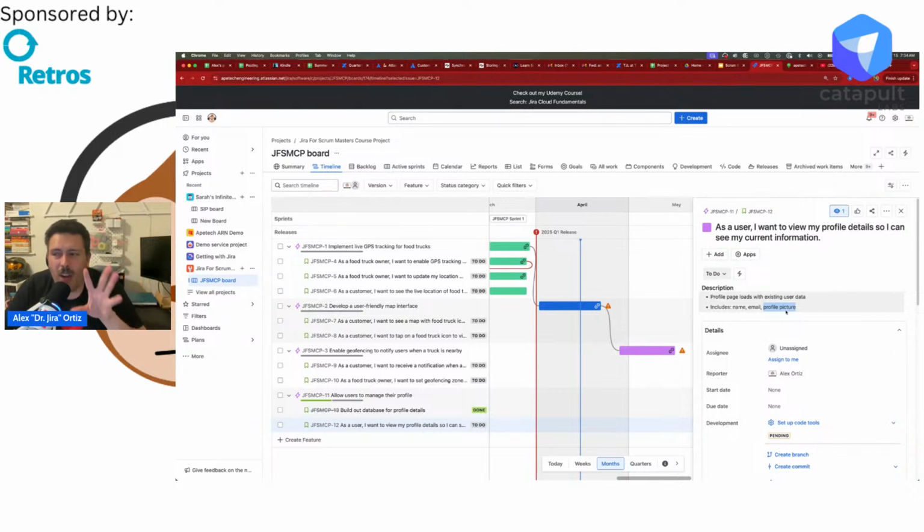And so again, you wouldn't want to negotiate and build it into this one because that's increasing the scope significantly, right? Adding key functionality of being able to edit profile pictures, maybe something that's going to take more than a few hours, I would create a new story. But again, the negotiation is, well, what if being able to edit a profile picture is a 20-minute thing, right? Well, in that case, yeah, let's negotiate and let's tweak the scope of the story a little bit, so that we can get that win as well.